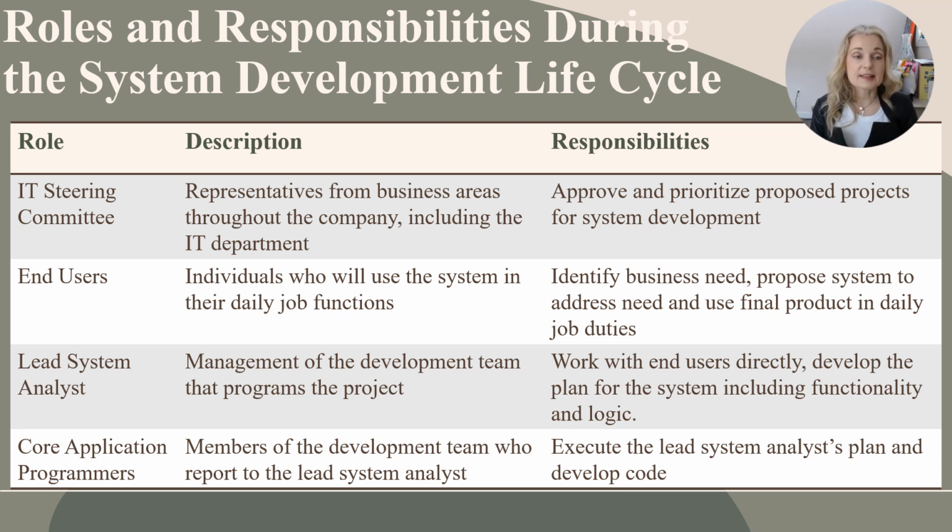We have the IT steering committee, who are representatives from the business area throughout the company, including the IT department. And their most important responsibilities are to approve and prioritize proposed projects for system development. There might be multiple departments requiring multiple systems, so they need to prioritize what should be created first, given the resources that the organization has.